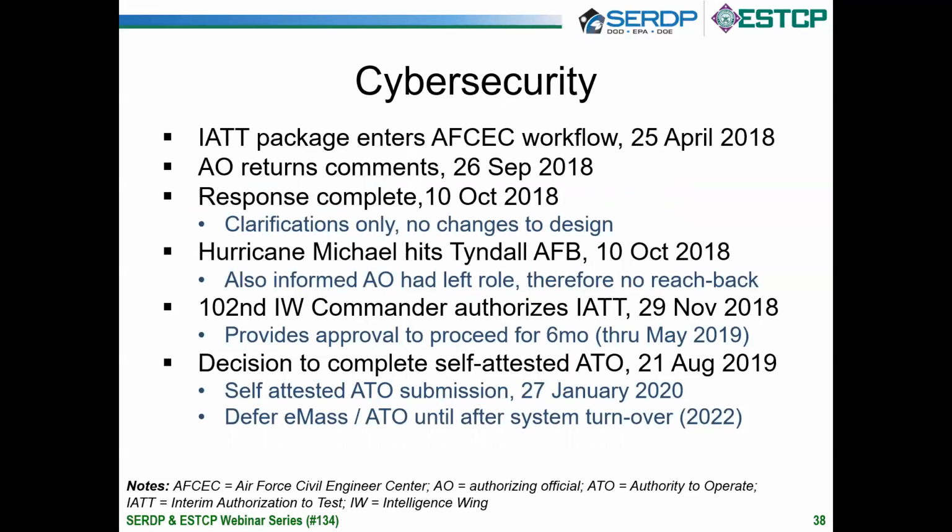Cybersecurity, of course, is a big deal for the DoD, and was quite a process, I'll say, on this project. We started off developing an interim authority to test submission, and submitted that back in April of 2018. We got some comments back on that package from the authorizing official, and none of them really substantive, but more administrative in nature. We completed a response to those comments, and didn't really require any changes to design. But when that happened, Hurricane Michael hit Tyndall Air Force Base, where the AO, or where the folks who actually do the security controls assessment reside, and the AO left the role. Therefore, we were kind of left hanging.